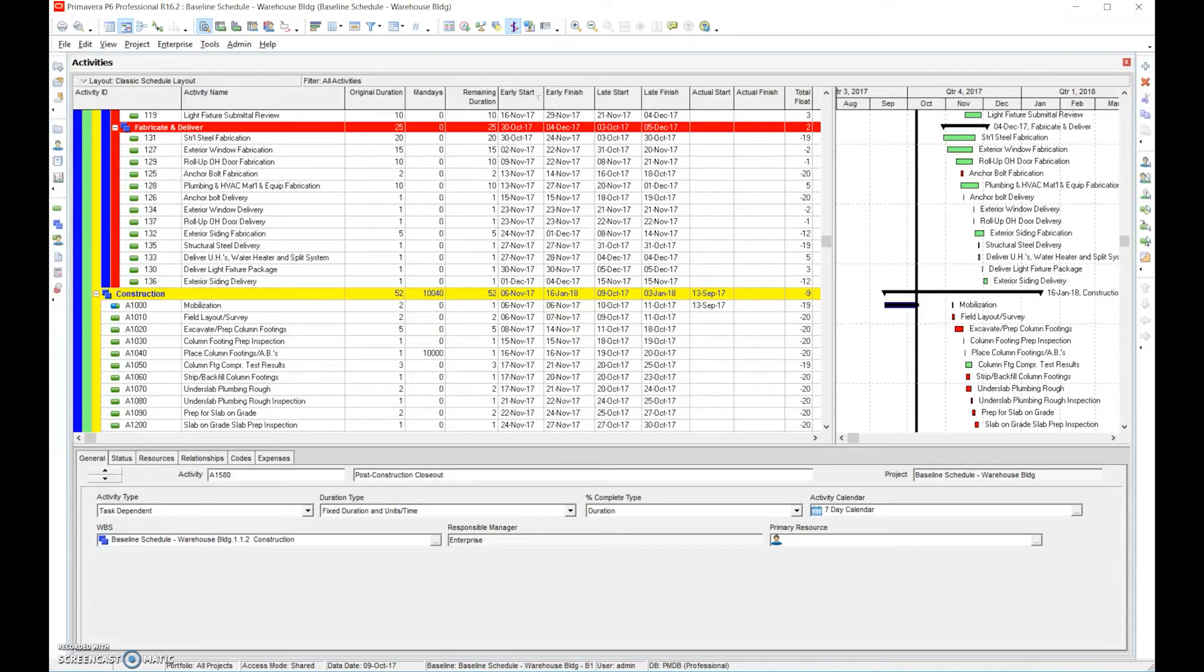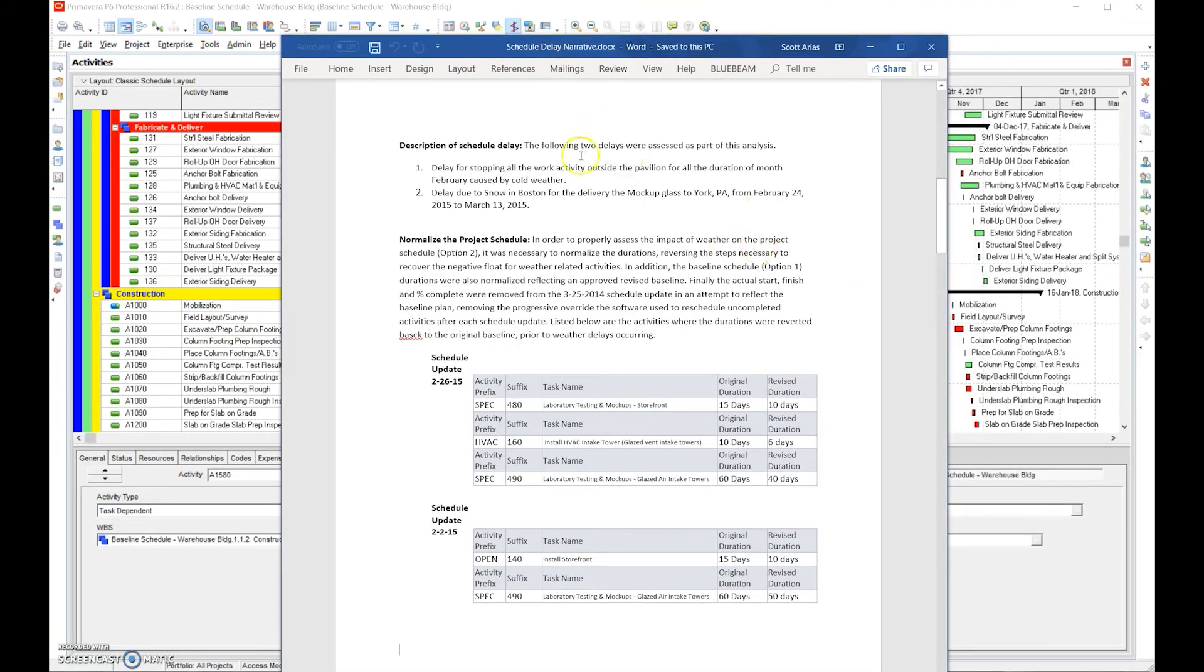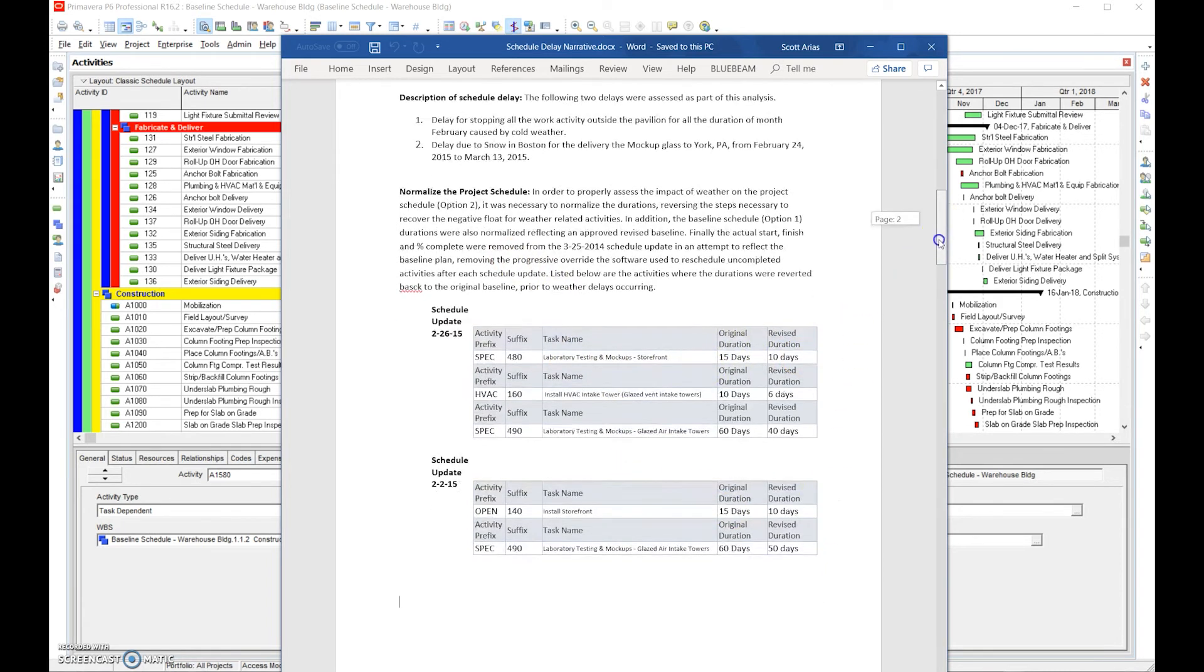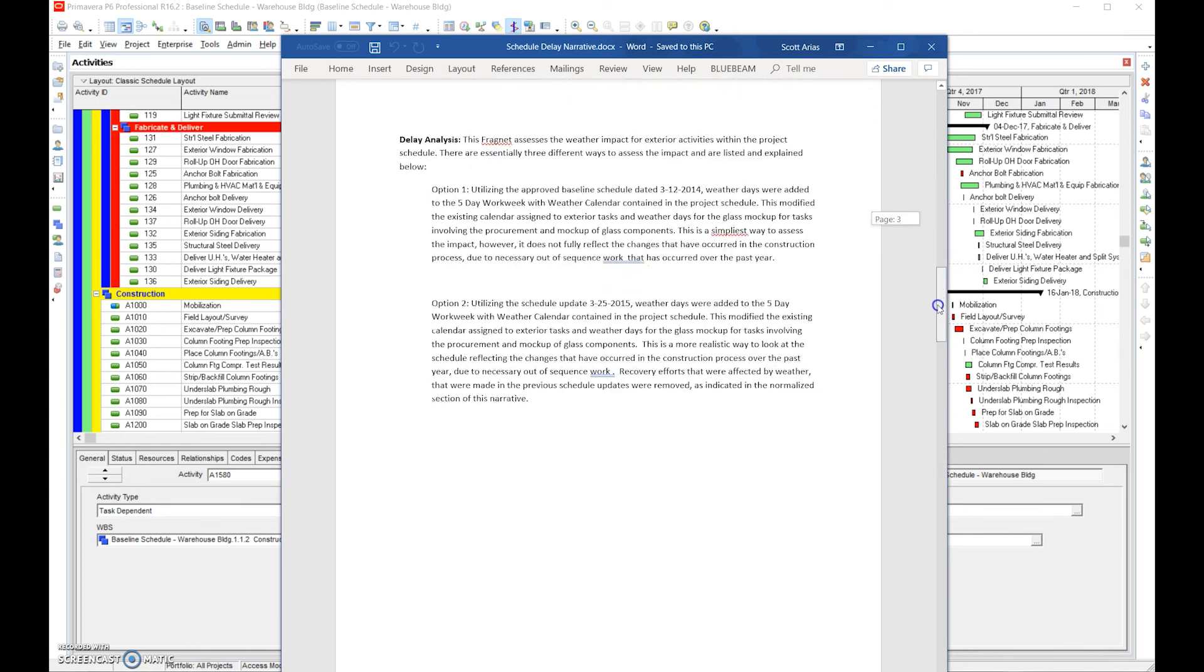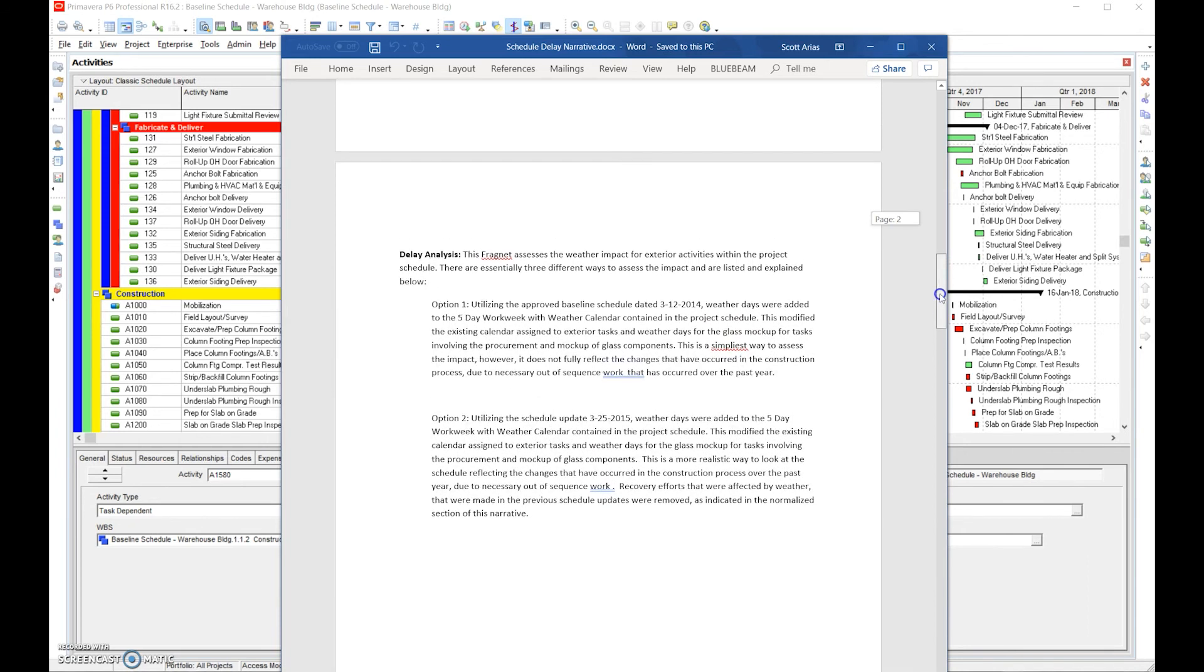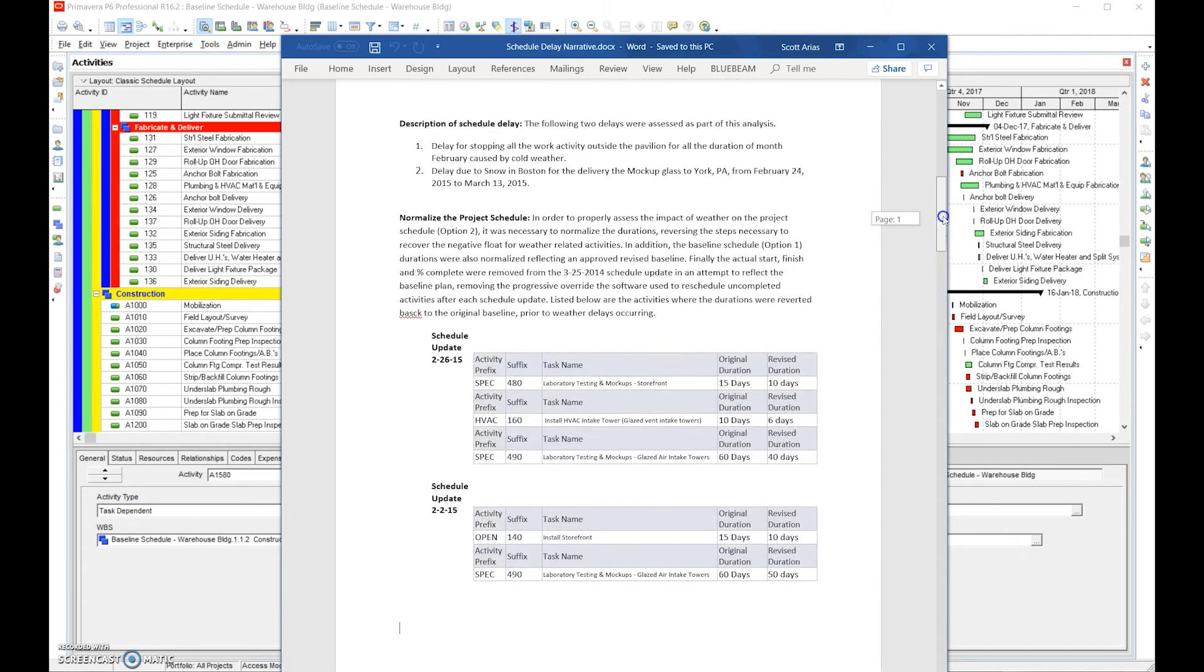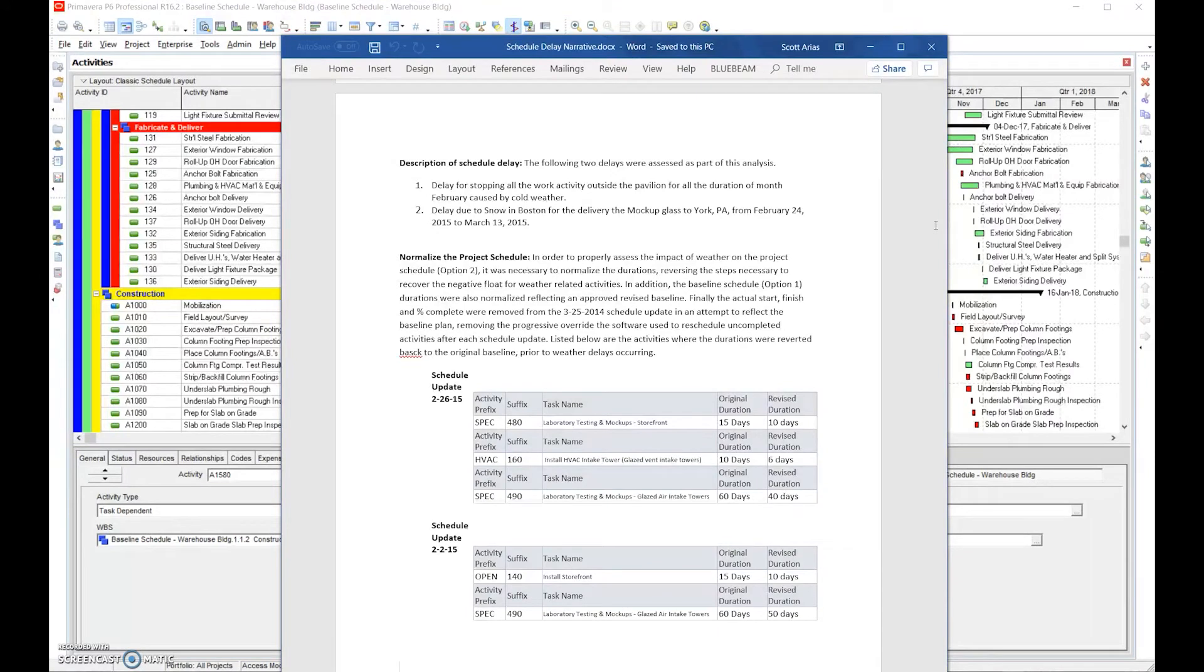So when you're doing a recovery schedule, here is a narrative, okay? This is a schedule delay narrative, and what we want to do is we don't only just want to change everything. As we're going through making these changes, we're going to document them, and we're going to explain exactly what we're doing. What did we do? We revised the duration. Why did we revise the duration? Why were we able to do that? Is there a reason? You want to give it an analysis of what you did, how you came up with a number, how you reduced the number of duration days. It's important to document exactly what you did during your recovery, whether you changed relationships, increased availability, or added additional resources.